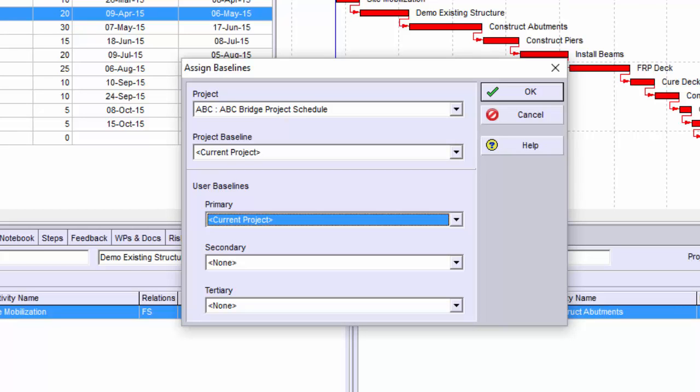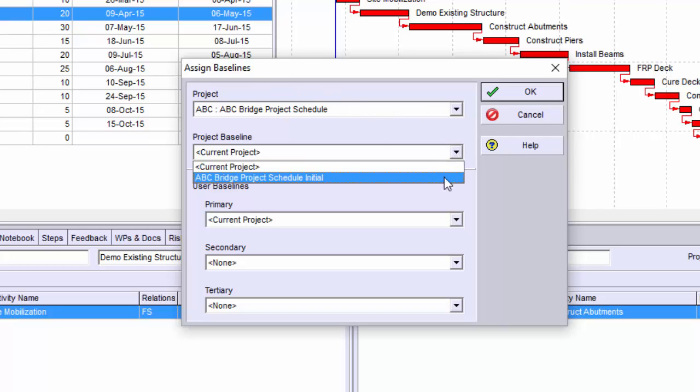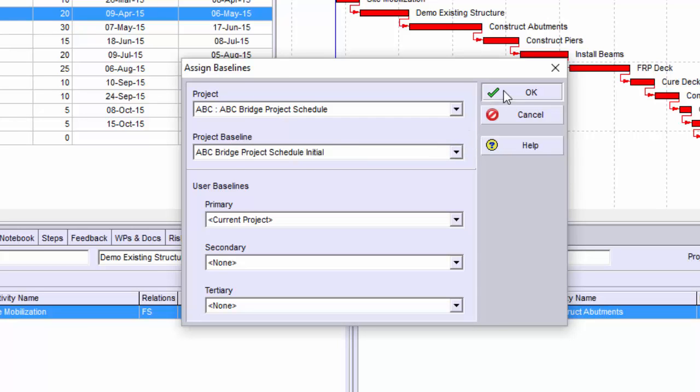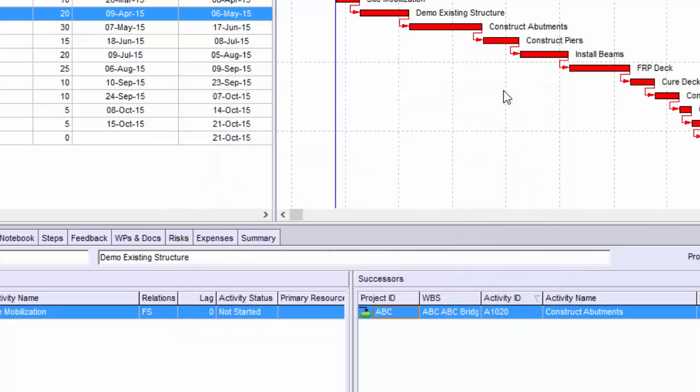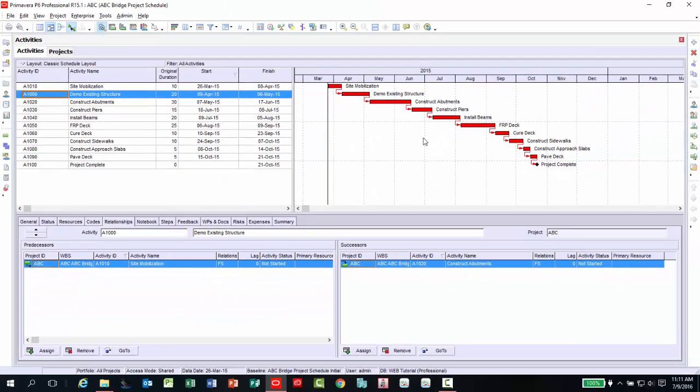Here, I will choose under the project baseline, the ABC Project Initial Project Schedule that we just recently maintained. Once selected, click the OK button. The baseline has been assigned to your current project.